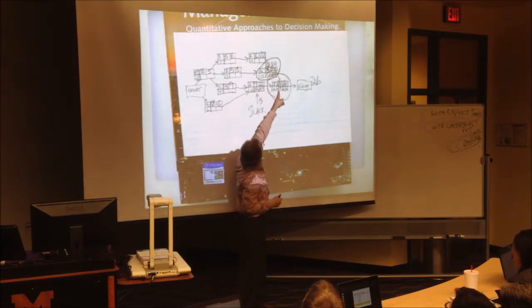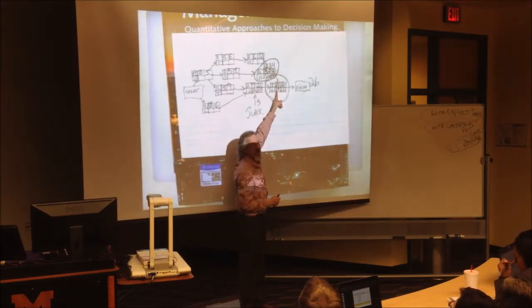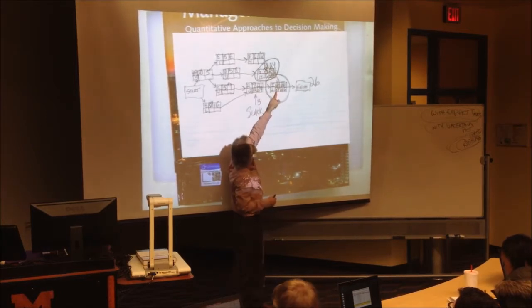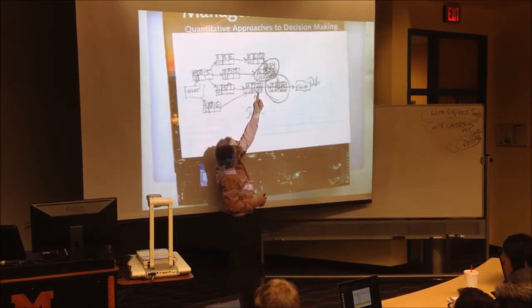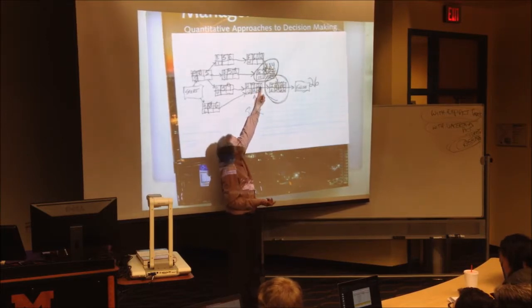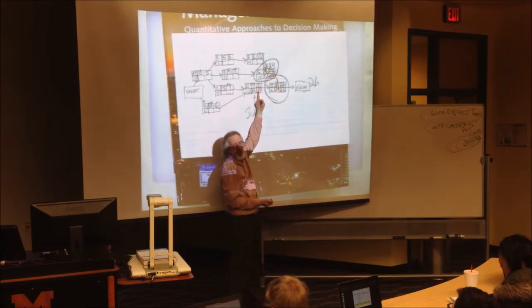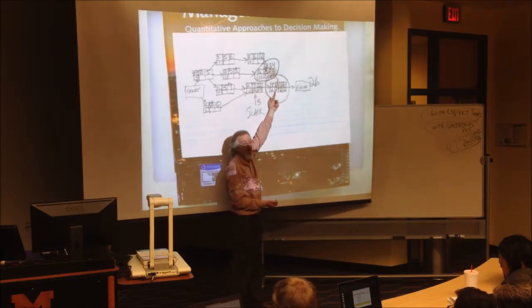It is only after I, and the latest start for I is 24, so I have to carry that over to the latest finish, because I has to start on 24. So this doesn't really have to be finished till 24. Even though we would like to see it finished at 21, it could be done at 21, but if it's not done at 21, it's not going to hold up the project. It could be done as late as day 24 and not hold up I.